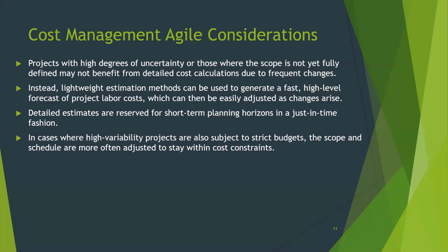So at the end of every year, they have to go back and say, in order for the work to continue on this agile approach, we need $1 million more for the year, or 2 million, whatever that dollar amount is, to continue developing the product or service using this agile approach. Those types of checkpoints serve to minimize the risk to the organization. Does that make sense? Does that answer your question?